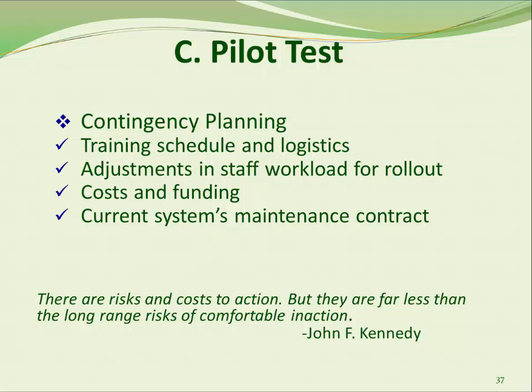A contingency plan will address such concerns as: what is the impact of a short or long-term delay? A delay or a critical error could affect the user training schedule and the logistics for training locations and trainers. Perhaps adjustments would need to be made to workload in preparation for rollout.